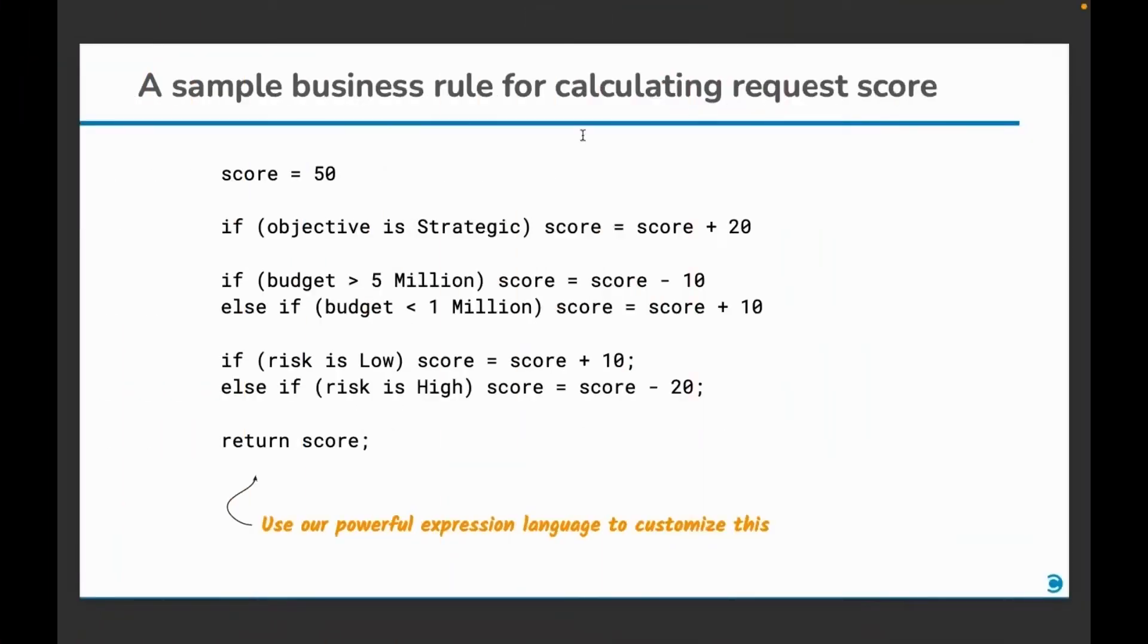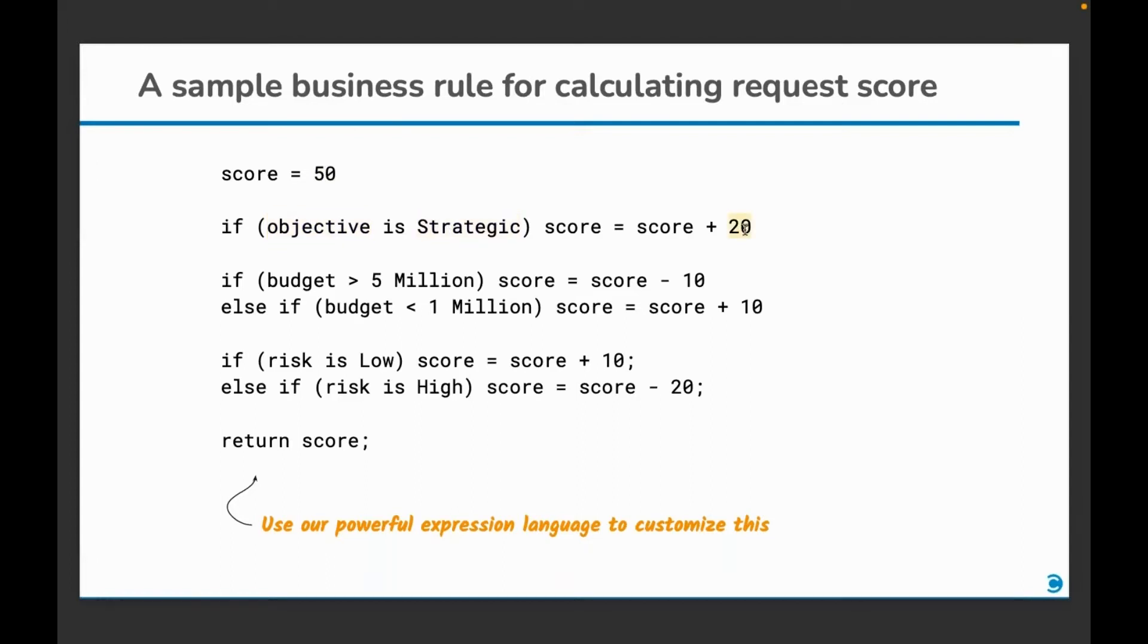This is a simple formula that computes the score of a request. Let's say the score initially of each request is set at 50. Then, if the objective of the request is strategic, then we add 20 points to the score because we want to encourage strategic projects.